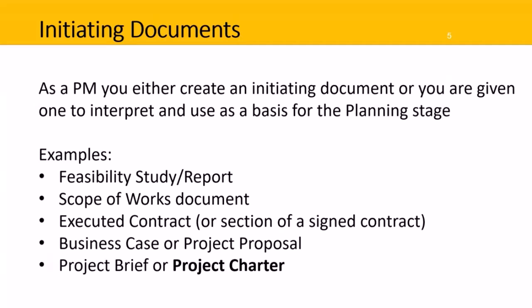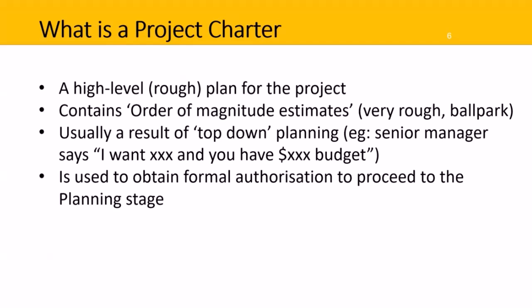Now, there are many different project charter templates available, so you might have been given one or use an internet search and you should be able to find a project charter template. So just to sum up, a project charter is a high level or rough plan for the project. It contains order of magnitude estimates, so that means they're very rough ballpark figures. It's usually a result of top-down planning.